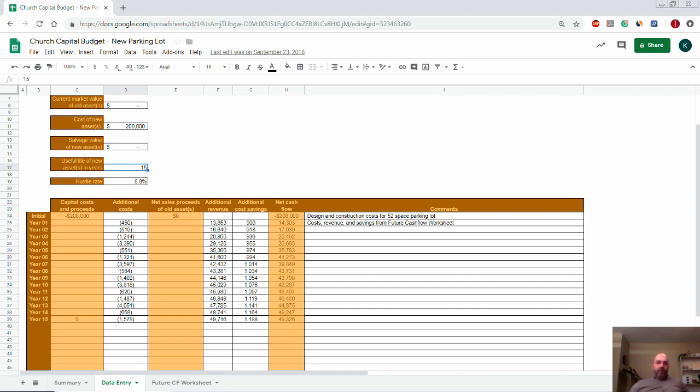So, this is another guess. Use the little rule of thumb trick I mentioned earlier if you need to, and err on the conservative side. In the example here, we used 15 years. Do keep in mind, though, that a longer life is going to inflate the potential value of a project. Everything else being equal, an asset that lasts 10 years is worth more than one that lasts 5 years. An asset that lasts 15 years is worth more than one that lasts 10. More cash flow, again as a rule of thumb, all things being equal, particularly if it provides a benefit and doesn't just have costs.